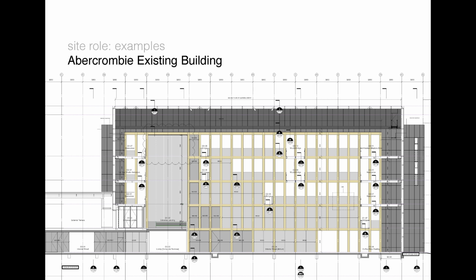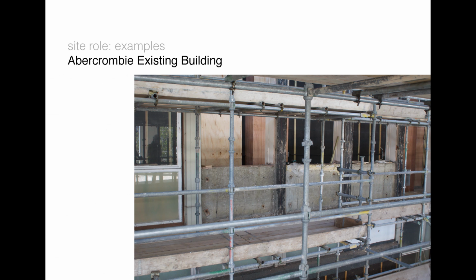But when we came to open it up on site, this is what we found within those panels, which is an upstand beam running all the way along. So where we had full height glass all the way along here, instead there's a concrete beam, which when you think about it, is obvious because the structure here, they've omitted a column at every other one, and in order to span that, they've added a beam across. But it's something that was never picked up on the building survey. It's something no one had any idea was actually there.